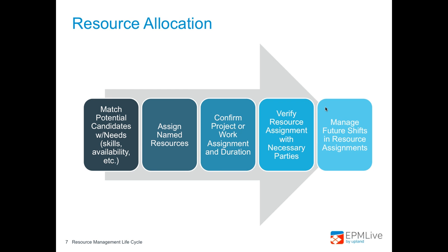All of these are key for maximum utilization and efficiency. If you have someone who's not trained in performing a specific role and is assigned to it, it will take longer to get the job done. So I always recommend looking at your project priorities as well. If you have priority 1, 2, 3, 4, 5, priority 1 projects or priority 2 projects need to have all the right resources with the right skill sets assigned to them before you move on to the next priorities.